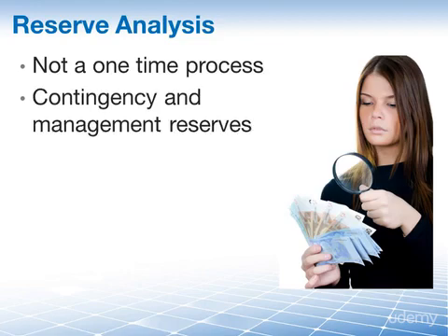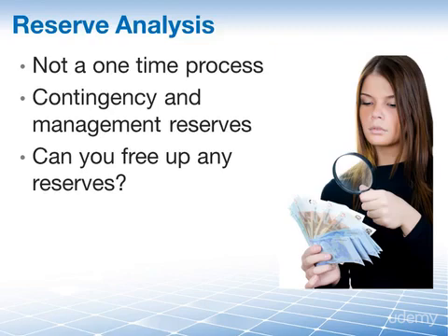You need to consider the status of both contingency and management reserves. When you look at the reserves, you need to determine if these reserves are still needed and if the timing of the needs is still as planned. You need to ask, can you free up any reserves? Perhaps a risk event which was previously predicted never came to pass. Thus, any associated reserves set aside can now be freed up.